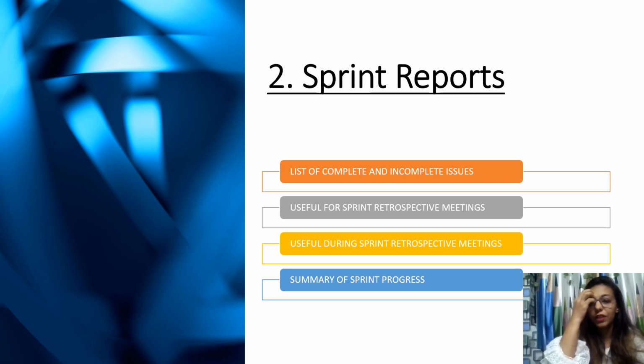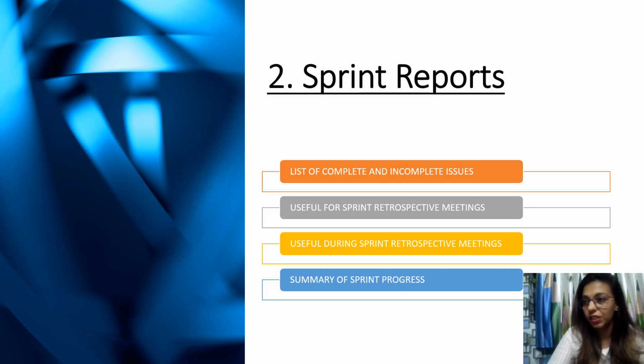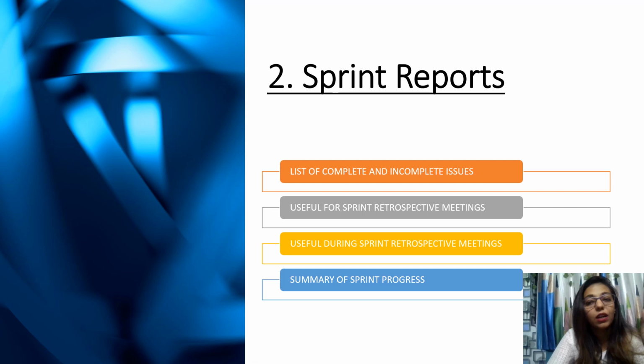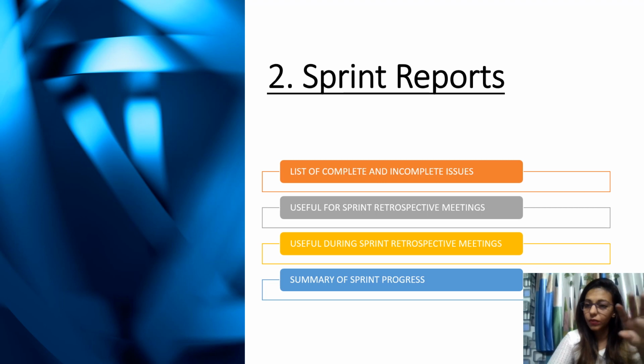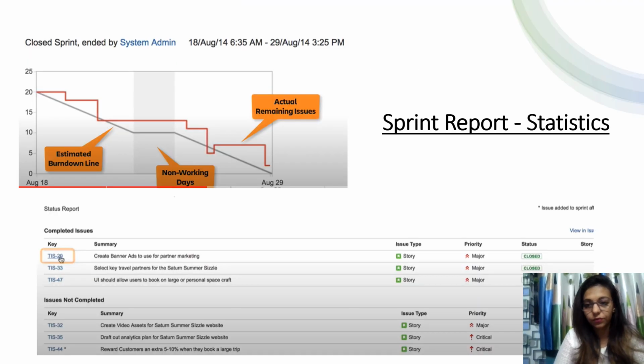Okay, so for this we need the stories to have their completion state, complete the user stories during the end of the sprint, and also time logging, which is very important for every graph to display. So time is logged every day whenever the work is performed, so that we get the zigzag lines across the straight lines. So that is also something important because it is all real time, okay. Then it is useful during the sprint retrospective as mentioned, and we can get the sprint progress.